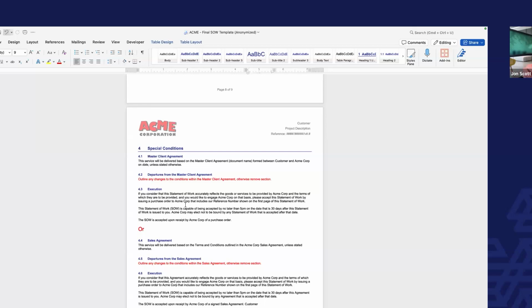So what you should be doing is signing a master services agreement with all of your clients, right? That master services agreement is essentially the negotiation around the terms of the services you're offering, how you work together, and so on. That's a separate document that should be decided upon and agreed upon before the statement of work, or sometimes it's done in parallel if it's a new customer.